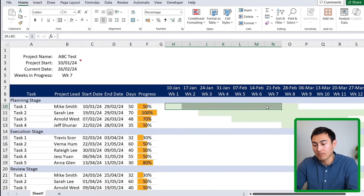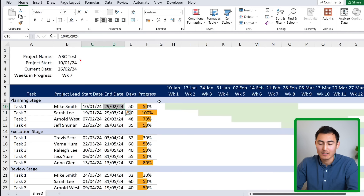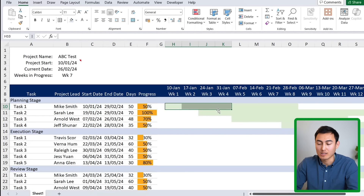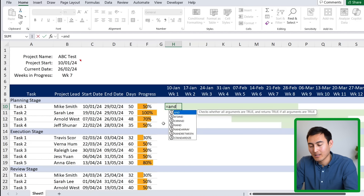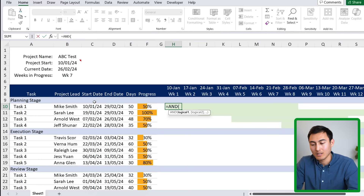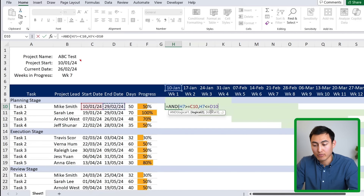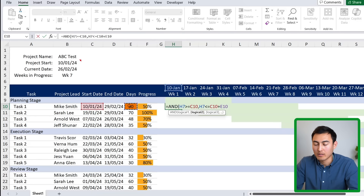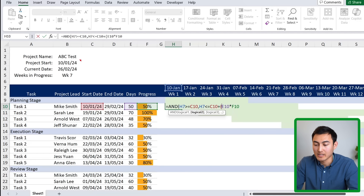Back to the video: we now have the light green bar and the data bar, but we still need a dark green bar showing actual progress. For a task at 50%, half the bar should be dark green. The formula is similar to before: the header date must be greater than or equal to the start date AND less than or equal to the start date plus the number of days multiplied by the progress percentage.